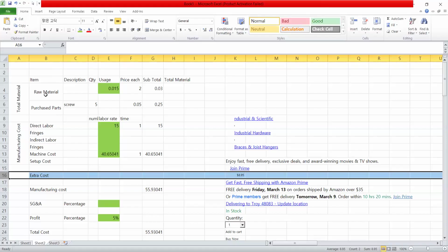Basically, wherever you see raw material, there will be some machining portion. In a purchase part, you will not see the machining portion, because you buy it for 5 cents, the raw material and machining are included, and since it is available in a store, you don't need to estimate raw material. So we will go through each item one by one.